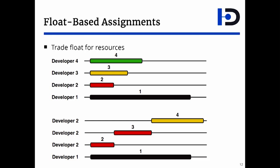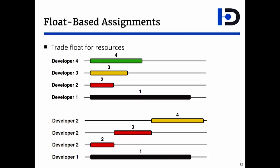Now, I could also do the same project you see on the slide using two developers. I would take the first developer and assign that developer to the first activity. Take the second developer and assign it to activity two. There's no point in deferring that. It has little float. But now what I will do is I will push activity three further down the timeline until after activity two is finished. By doing so, I will reduce the float of activity three. In this case, it went from yellow to red.